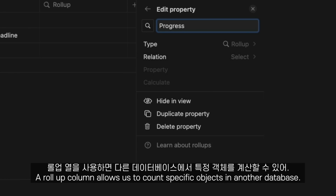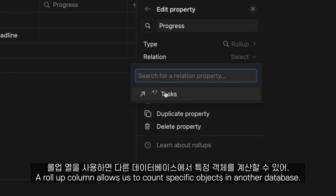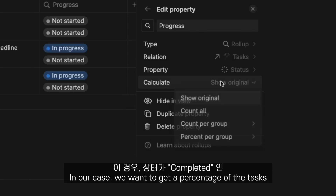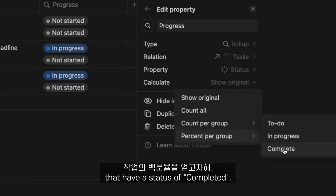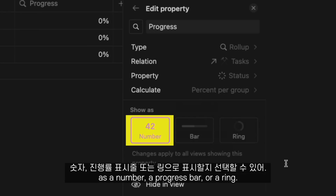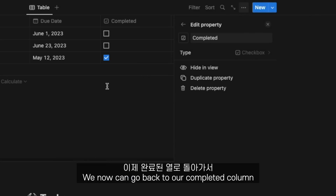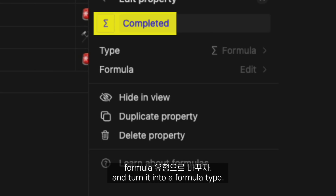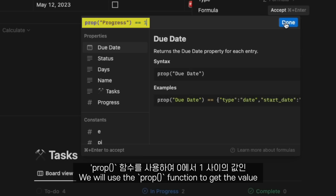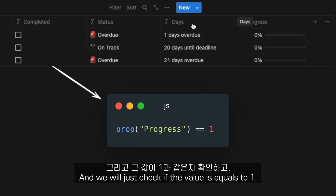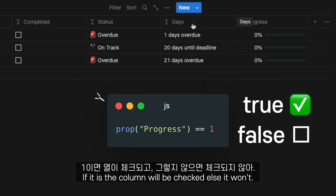A roll-up column allows us to count specific objects on another database. In our case, we want to get a percentage of the tasks that have the status of completed. We then choose if we want to see this count as a number, a progress bar, or a ring. We can now go back to our completed column and turn it into a formula type. We will use the prop function to get the value of the roll-up column, which is a value between 0 and 1 — 1 being 100%. And we will just check if the value equals 1. If it is, the column will be checked, and else it won't.